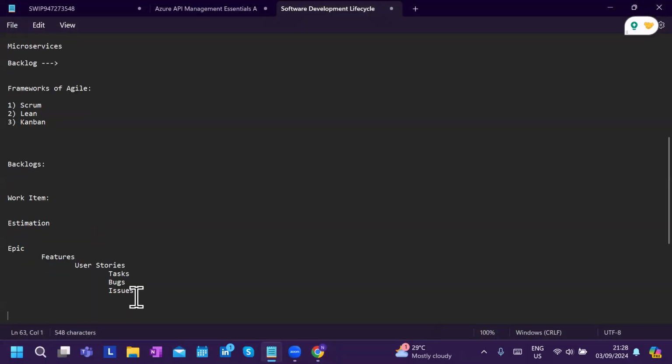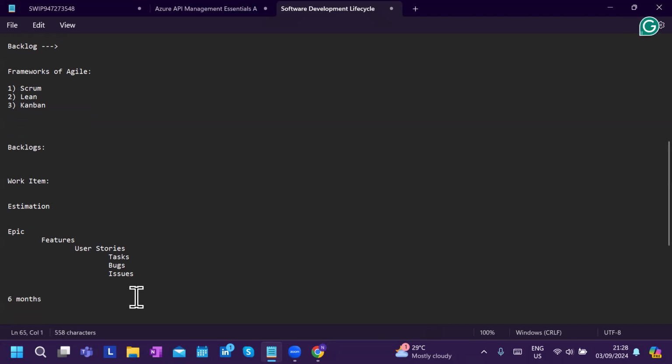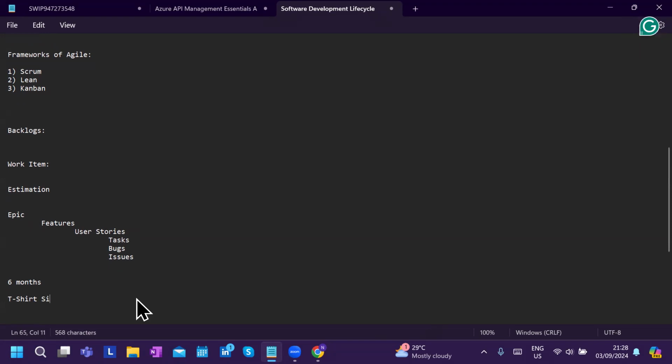Now, let's say a new work came and I have planned it for 6 months. So the first thing that I do is I will try to do a t-shirt sizing for my feature or epic. So when you estimate a bigger chunk, right? A big task, let's say a big project, you basically t-shirt size it. Okay, it's called t-shirt sizing. So let's say I assume that, okay, this entire thing is going to take me 3 months, which is roughly around, let's say, 12 weeks. Okay. So I have already sized my entire thing into 3 months, for example.